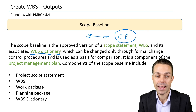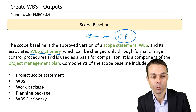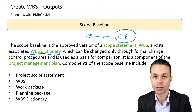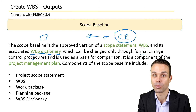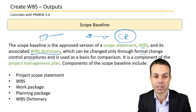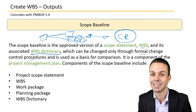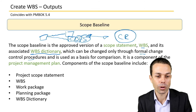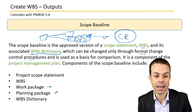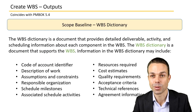Once the scope baseline is approved, it can only be changed through a formal change control procedure, and it's used as a basis of comparison as the project progresses — this is the scope we've locked in, and now we track whether we're on track, how cost and schedule are going, and whether the scope itself is changing. Components of the scope baseline include work packages, planning packages, the WBS dictionary, the WBS itself, and the project scope statement.